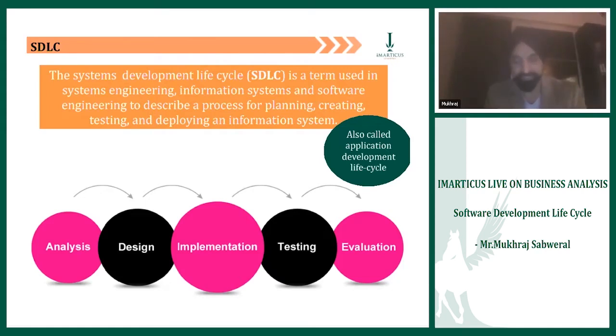All put together, Rajesh is going to arrive at a certain conclusion. He is going to bounce that conclusion off his stakeholders. And then, with the joint consensus, taken after arriving at a cost benefit analysis, they can clearly see that yes, there is a large benefit in automating our current paint shop. If that is true, then they give it a go ahead, and the project shifts from analysis to the design phase.